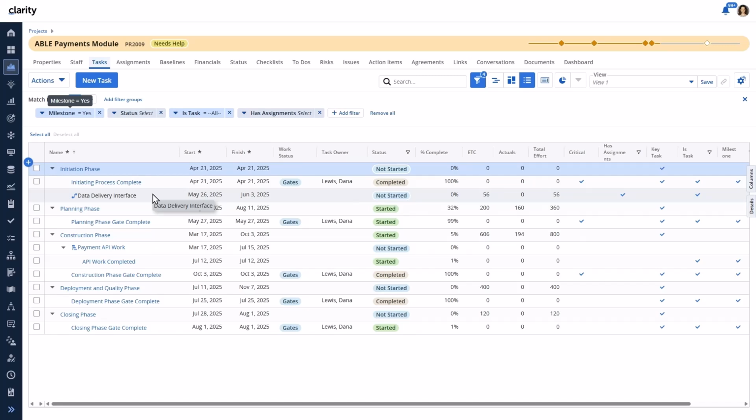This is a master project which has a subproject. The subproject proxy task is always returned alone or with the subproject tasks matching the filtering, as in this case, where we see the milestone task from the subproject.